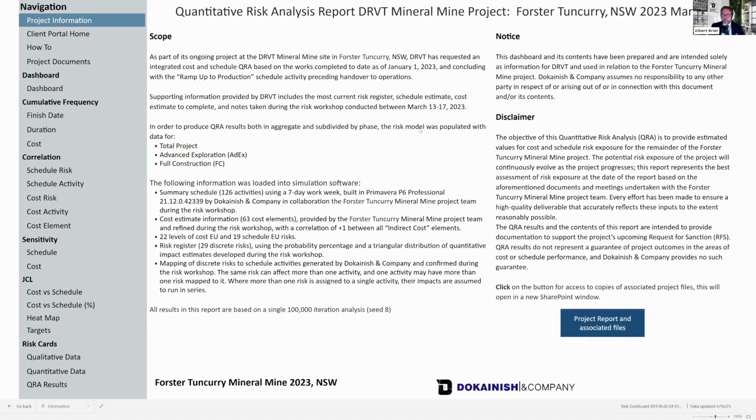If you're doing an integrated cost and schedule Monte Carlo simulation, then there's a lot of information to say about how the model was set up. You have to get into how the integration was accomplished, where the model seed was set, whether you use hypercube sampling or something similar to economize on your calculations. That kind of thing is all here on this front page.